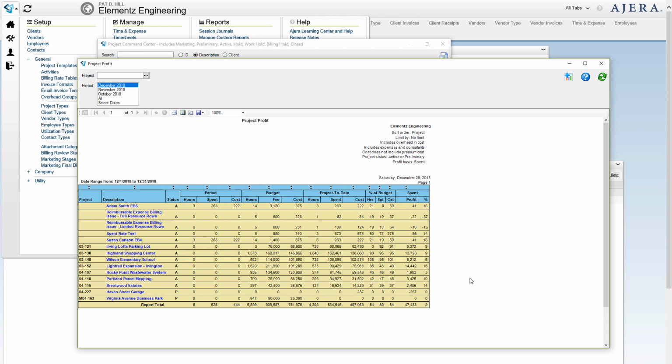A lot of firms really struggle getting a standard because it's so hard to go in and get the time by total project and then by each individual phase. Here the system captures it for you. You can create a SKU that's rough as a first cut, and then over time just keep iterating and fine-tuning it, and you'll get some decent SKUs over time. So, project profit.